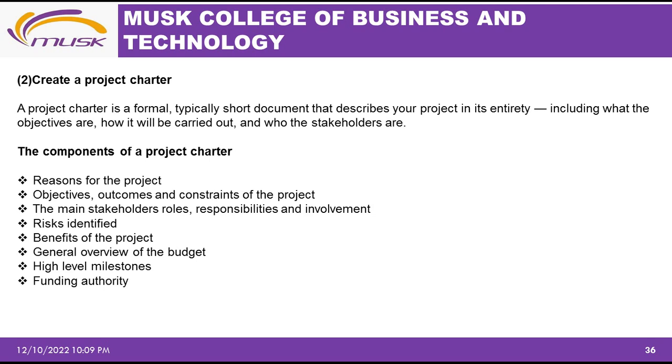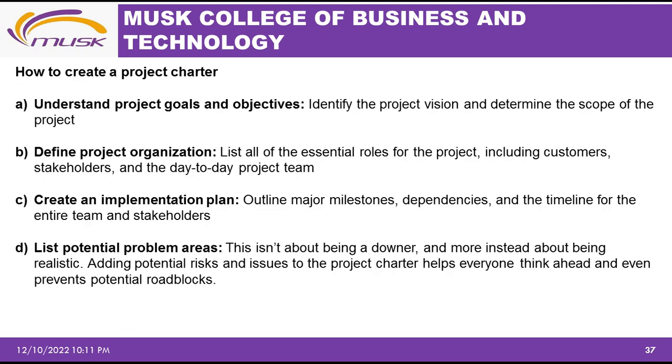For example, if we are doing a construction of a building, we can say milestone 1 would be maybe once we are through with the ground floor. If it is a course like this we are doing, at some point we will have assessment point 1. We can call that one a milestone, or a point in which we can carry out some assessment. And then we have, how do we create a project charter?